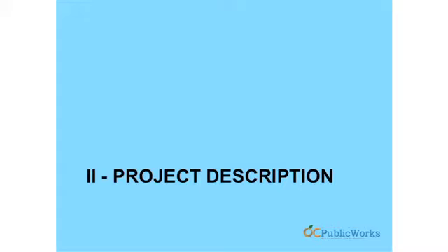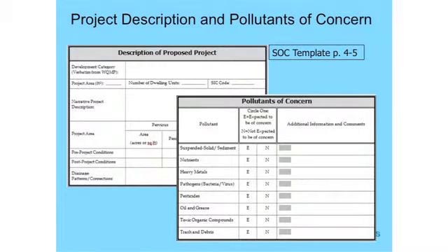So the project description, and this is not looking for you to break the project down in terms of A through Z drainage management area. This is not where we describe the project in that level of detail. This is where someone describes the general overall nature of the project in adequate detail to define specifically what the project is, the bounds within which it'll work, the type of land uses it proposes, the acreages of those land uses. And the purpose here is to make sure that the project description doesn't change significantly from what they've gotten approved as part of discretionary approval and what ends up ultimately coming in for final approval. That's one purpose of this.